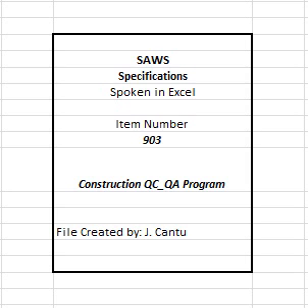7. Submittal review and acceptance. SAWS responsibilities regarding submittals include, but are not limited to, the following. A. Review list of submittals, prepared by contractor, against requirements of the contract documents. B. Review contractor's submittal control document for compliance with submittal schedules, review time, and procurement lead times. C. Check submittal control documents against construction schedule. D. Continually monitor status of submittals. E. Respond to submittals in accordance with contract documents. F. Enforce submittal requirements of the contract documents.